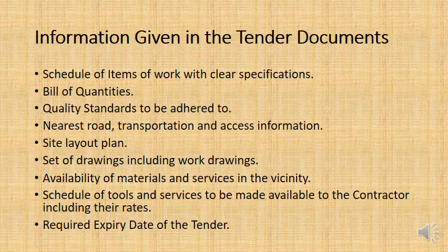And also tools. There'll probably be one site generator to provide electricity and so forth. Well, you've got to tell the prospective contractors what tools are available, what services are available, and if there's any rates associated with them. So, hey, you can use the generator, but we will make you pay so much for using it, and so forth. You need to make sure that that's clear to the prospective contractors.